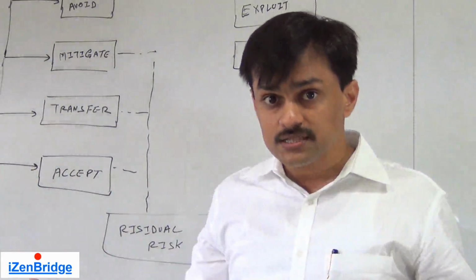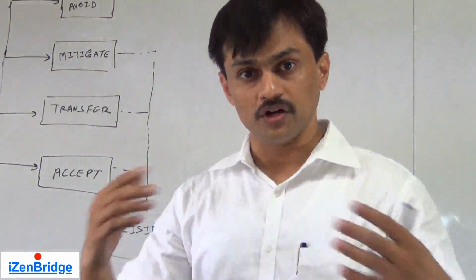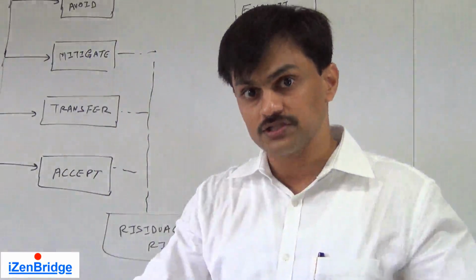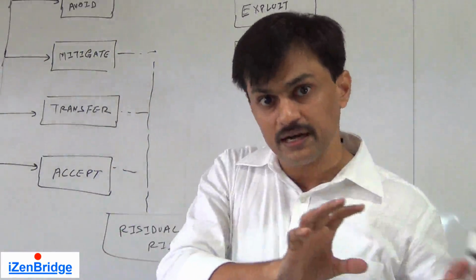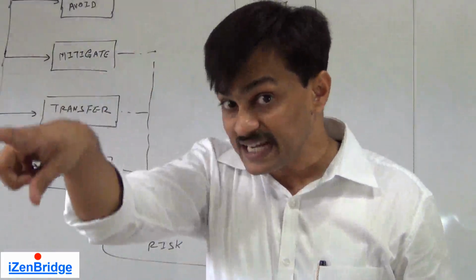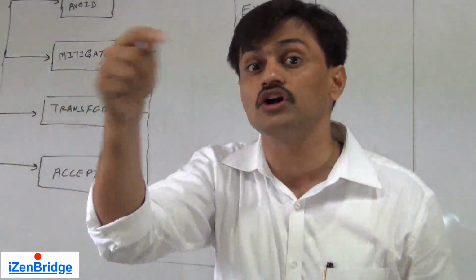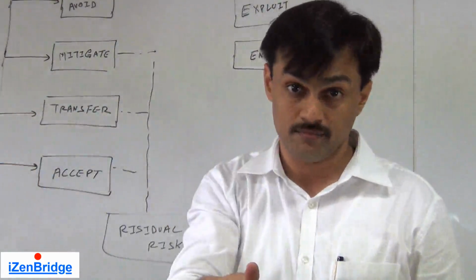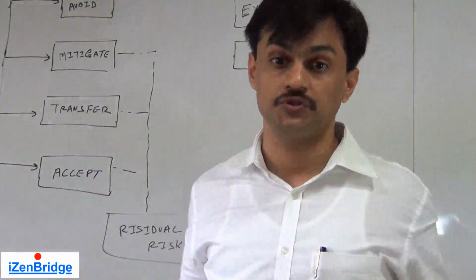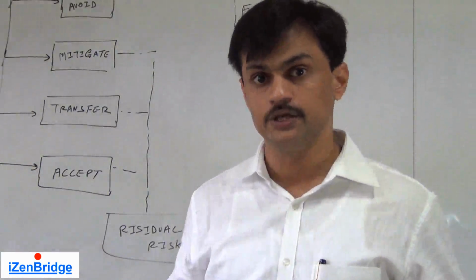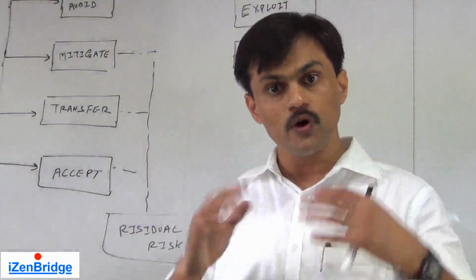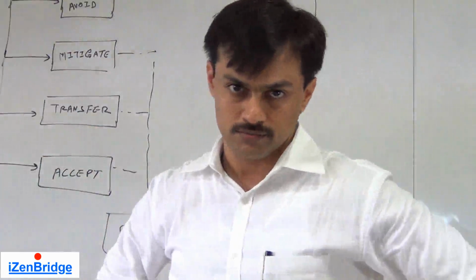The first thing is that you talk to your project manager, or a project manager talks to the stakeholders and makes sure that this component gets removed from your scope altogether, and that team becomes responsible for delivering you this component on time. If you can achieve it, you have exploited the opportunity. You made the case, you explained to the management that this is something that should be delivered by them to you and you should use it and move forward.